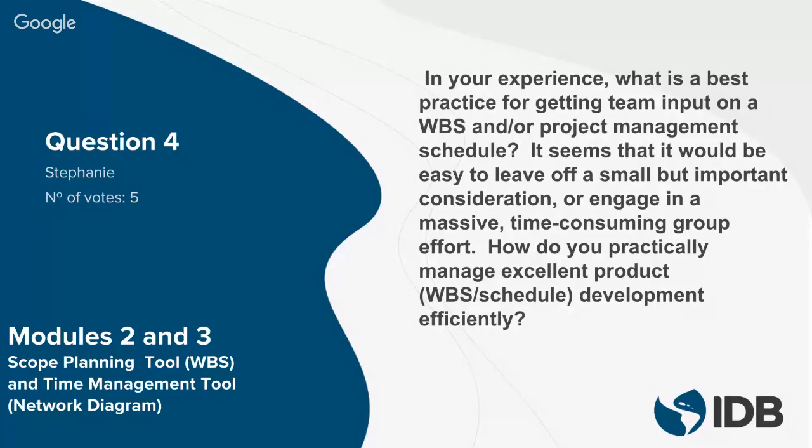Okay. As I told you earlier, it is very important in a project to take the time to do the exercise of a WBS. The more time you take, the more detailed it will be, and the more of the benefits that I've said earlier you will be able to see. Having a good WBS is the big difference between a ballpark estimate and a detailed estimate. So the more time you take to do the WBS, and the more time you take in doing this team exercise, you will be able to have a more detailed estimate.